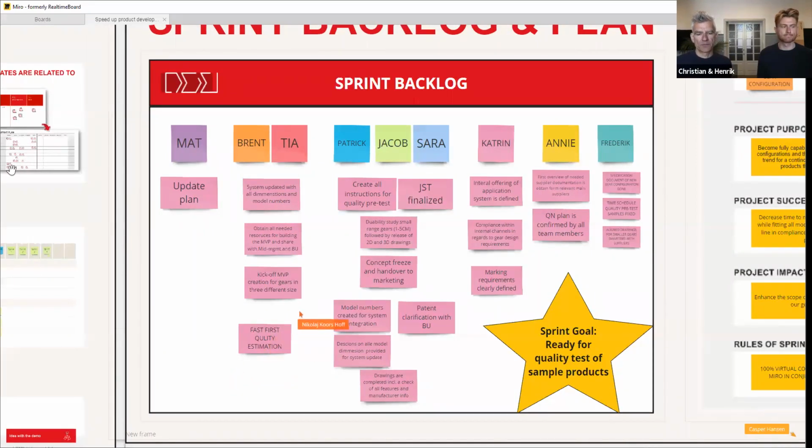Actually, here's roughly 20 sprint backlog items. And it should never be more than that, because we have to be aware that people don't start putting in stepping stones, like take the phone, call somebody, but it's at a level that constitutes a sprint deliverable. So they did that here, and now we had the sprint backlog, and we talked about that, and everybody in the team agreed, yes, that's good. It's typically very ambitious, but I think we can do it.